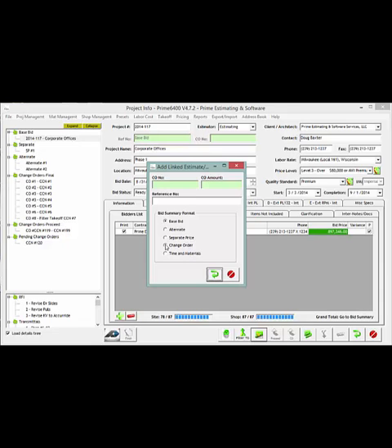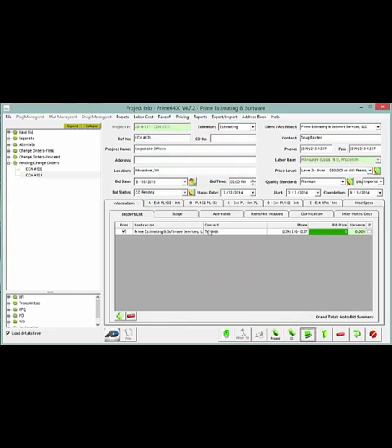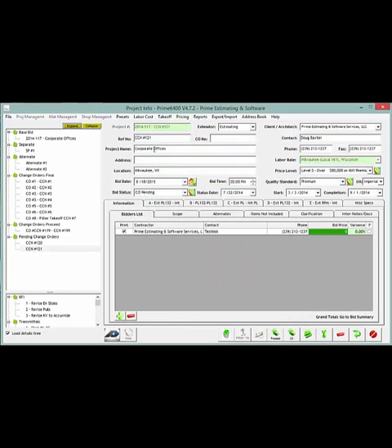But where we want to go right now is to change orders. From change order we want to put in a reference. This would be maybe change notice number 121 would be the next one to be priced, and we'll hit return. Now that we've done that, we've copied all the base bid information into a new project. It is titled that change notice or change order, whatever the project reference is. You'll see that it's showing up now in the pending portion of the tree structure on the left hand side here, and now you're ready to go in and start doing some pricing.